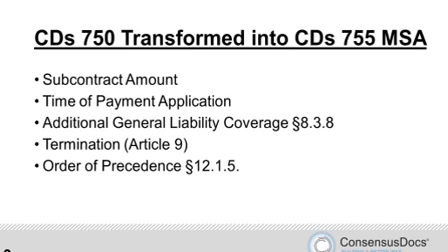That also carries over into the treatment of contingent assignment for the situation where an owner terminates the contractor and they have in their contract a contingent assignment of subcontract provisions. Obviously, in that case, you're not contingently assigning the entire master subcontract agreement relationship. It is, strictly speaking, just what flows from the project work order.